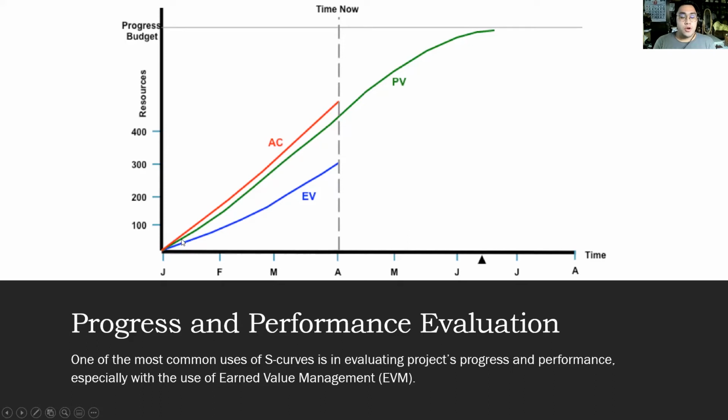If you draw the forecast S-curve on the graph, you will be able to see the project growth and slippage. This simple S-curve quickly reveals any divergence from the baseline plan and allows the project to be monitored effectively.